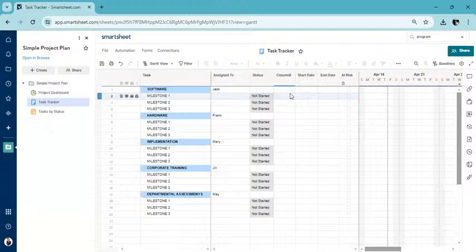So I'm making an exception here. I know that the purists will say milestones are zero duration, and it's true. But for the sake of this rather unique circumstance where you're tracking it, you can actually have how long the endeavor would be, okay? Now, I would rephrase it. I wouldn't say milestone, to be professional, okay? Because indeed, there's zero duration. So you would have to creatively say something like this.